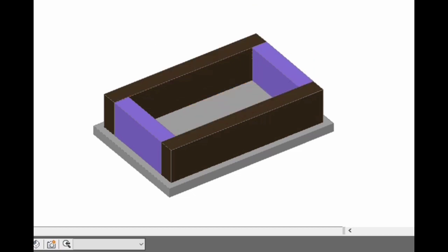Okay. You can observe here the long walls which is measured outer to outer, and this is the short wall. And inside this you are going to put the flooring. You take up the internal dimension.